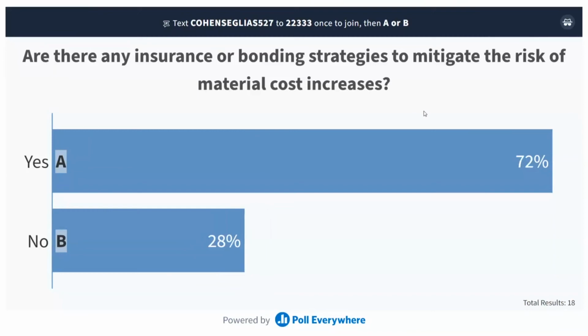I don't think there are direct, and Tom, I'll open this up to you. My experience wouldn't say there are direct insurance. I mean, obviously you can't get insurance for your own work, right? That's a typical exclusion that would be in a general commercial liability policy. But you can get insurance for a defaulting subcontractor, and you certainly can require, even if you're the prime, there's additional cost, but you could definitely push down the risk through a performance bond.